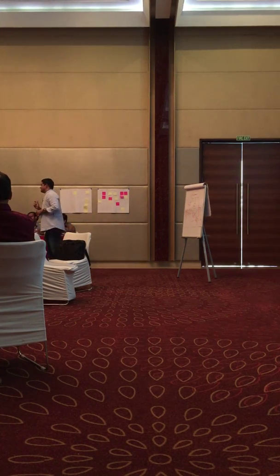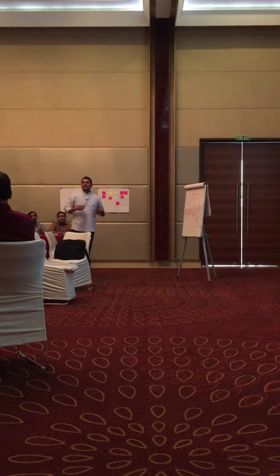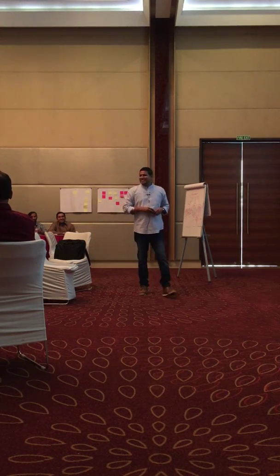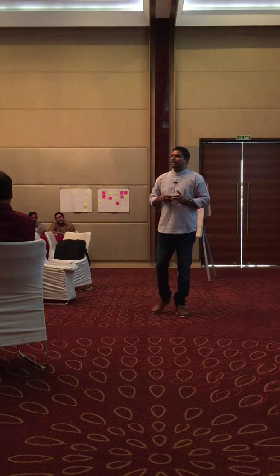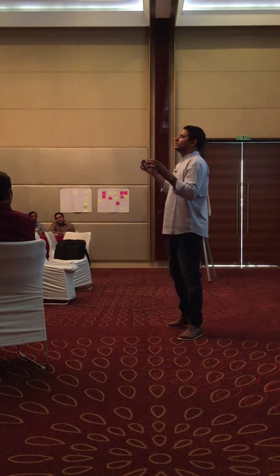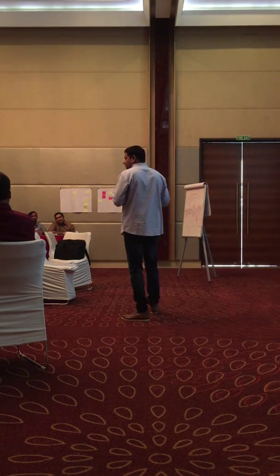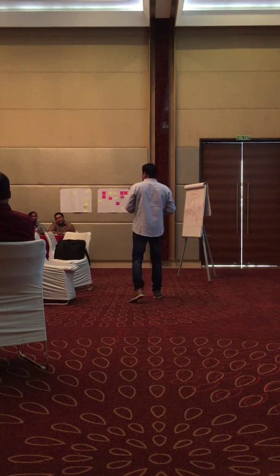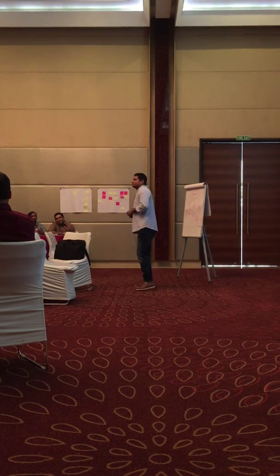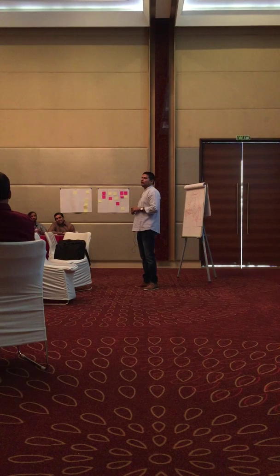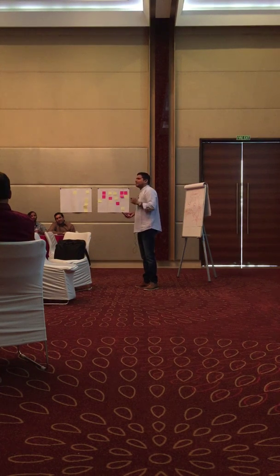Are you a project manager? See, I'm a good astrologer. Okay, this is a very good question. The traditional waterfall has 10%, 50%, 100% like that. Here, you have either 0% or 100%. Because, what is principle number one? Valuable software. I'm done with the development, only testing pending. Is it valuable?